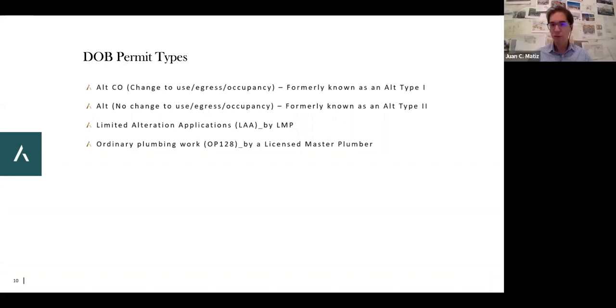No, I think these four categories are very clear, from the most serious requirements at the top to the least amount of requirements at the bottom. I would also just highlight that for the first two, which are what we would call construction projects, a construction project, be it me moving one wall over and making a room bigger and moving a door, that wall that we just talked about will require the same exact amount of paperwork and process as if you're gutting your entire apartment down to the slab and relaying it out completely. The DOB sees those two things exactly the same way.